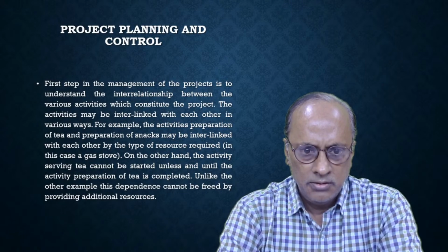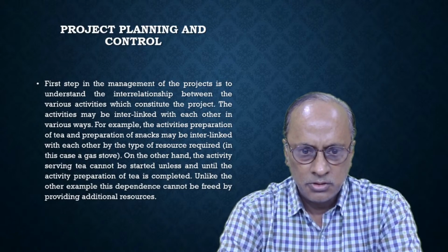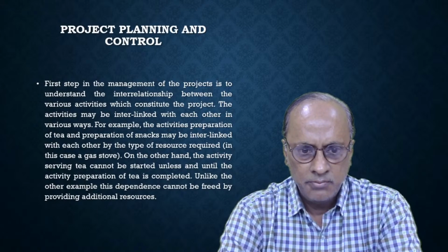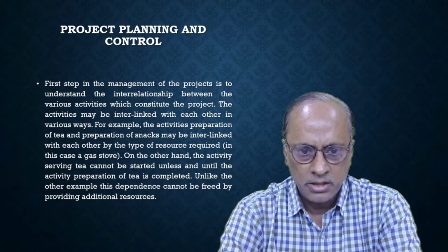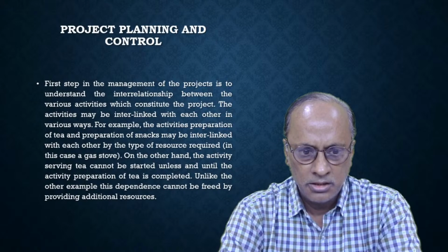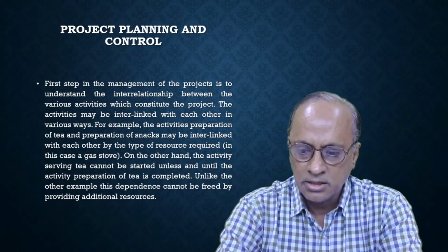Suppose I give an example here, the activities of preparation of tea and preparation of snacks. Suppose the gas stove is one and we are preparing tea. Unless the tea is completed, we cannot prepare the snacks. Unlike other examples, the dependence cannot be freed by providing additional resources.